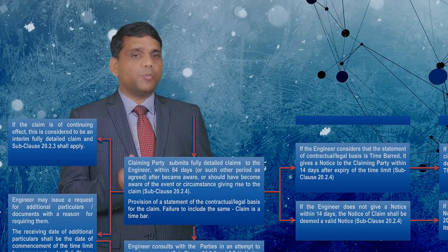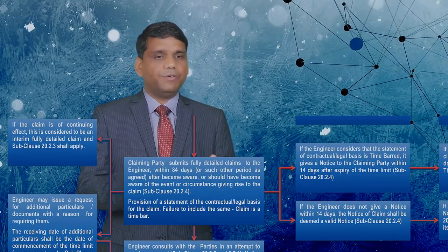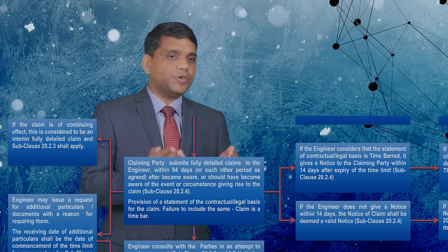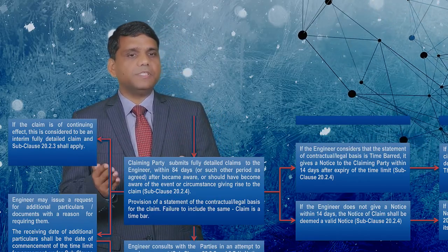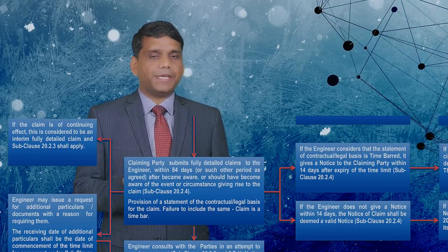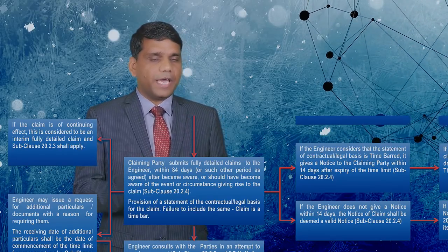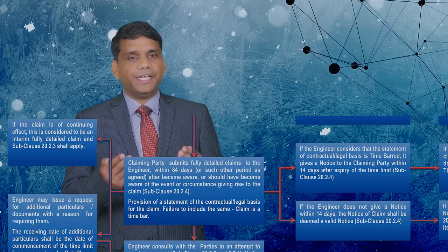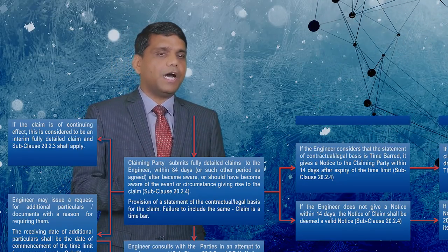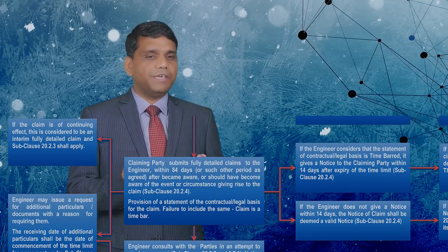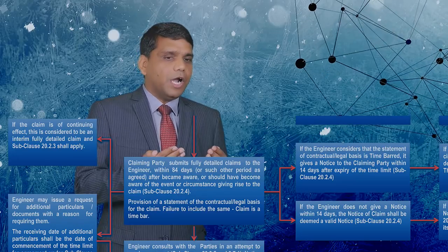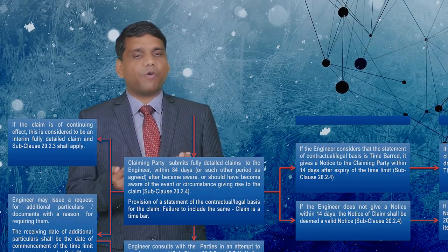The claiming party is obliged to submit a fully detailed claim to the engineer within 84 days — or such other period as agreed — after becoming aware or should have become aware of the events or circumstances giving rise to the claim. Along with this fully detailed claim, provision of a statement of the contractual and legal basis of the claim is required to be submitted.